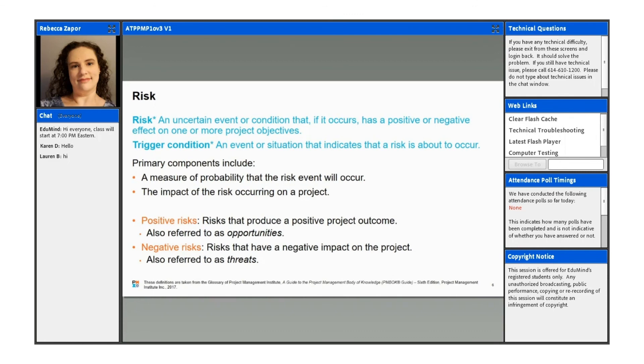Risks can also be internal. So these are things like if you have a change in staffing or maybe a change in governance, say you're moving from a more waterfall methodology to more of an agile methodology.